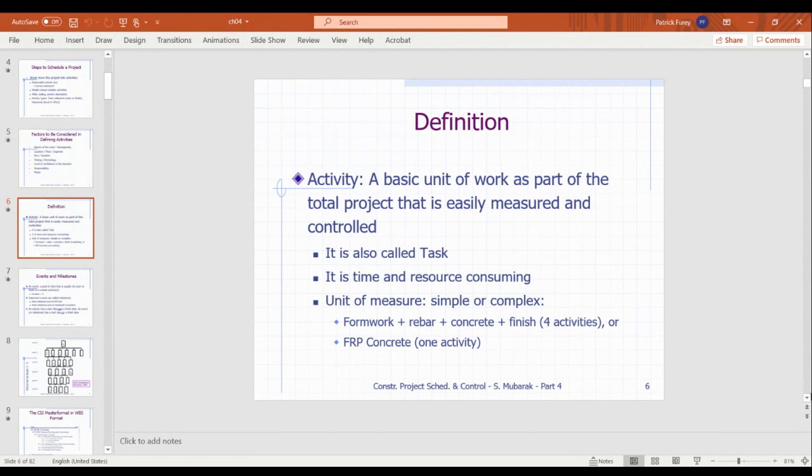We've talked a little bit about resource allocation. The schedule is the best tool when you're talking about resource allocation. If you don't have schedules, if you don't attach resources to those schedules in terms of man hours or crew size or anything like that, a lot of companies will be lackadaisical about that, and they won't be loading all that stuff in. Sometimes it's not needed. It's a small job. It's not a big deal. Maybe all your jobs are small jobs. It's not that big a deal. But in a lot of cases, if you're not loading your resources, basically you're not forecasting your future work.